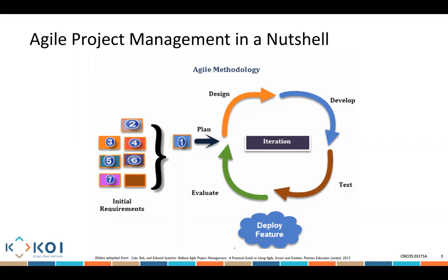I explained to you a format last week. Identify the user. As a, I explained we started as a, what? As a user, I want to log in the system because. So that I can achieve something. Okay. So as a user, that's a user. I want to do something so that I can achieve something. And that's really what you need to go and actually write down. So you're writing your user stories.